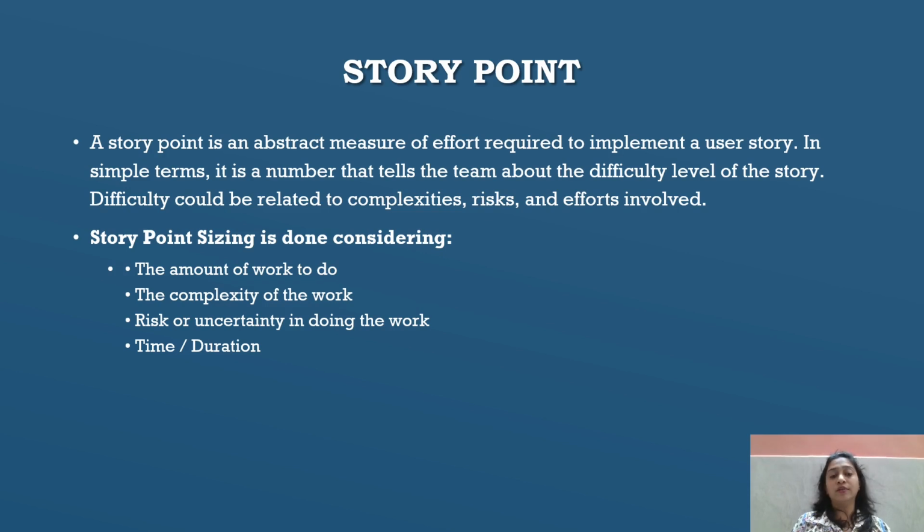So we are estimating the story points on the basis of these three: risk, complexity, and effort. The story point sizing is done considering the amount of work to do, the complexity of the work, the risk or uncertainty in doing that work, and the time or the duration. Okay, how much time is required for that.